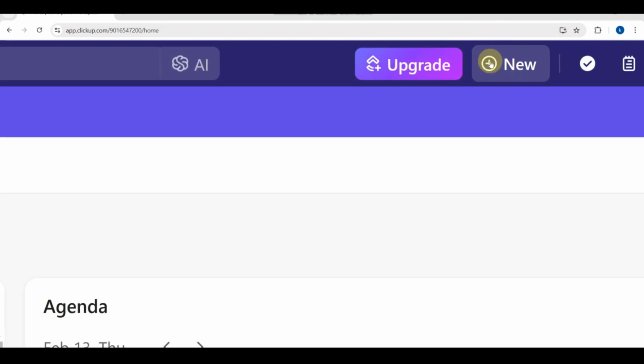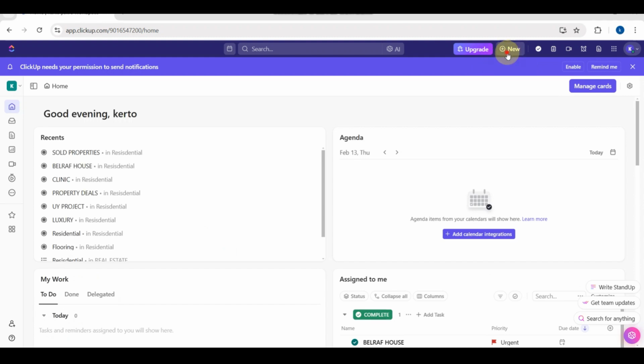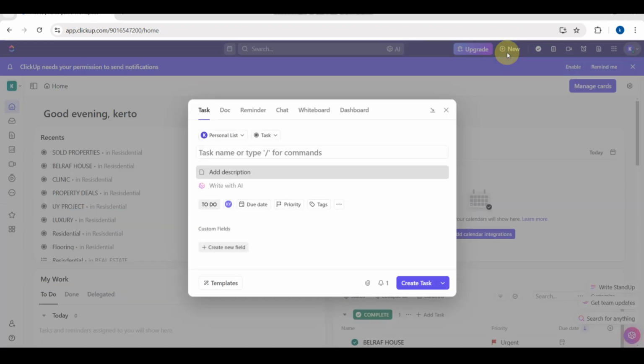So by applying a ClickUp template guys, you need to choose the template that best fits your needs. So you can click use template and select where you want to apply it, for example, the space, folder, or the list. And then when it comes to customizing the settings, you can adjust task statuses to do, in progress, or done. And of course, you can modify assignees and the due dates there.